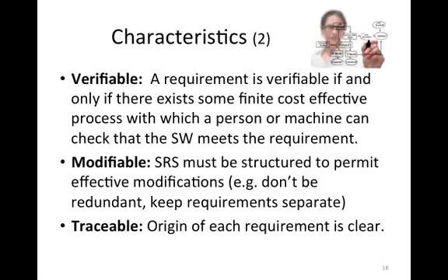We might put in verifiable requirements in terms of time. We might say people should be able to get a response back from the computer in 2 seconds. But we need things that are verifiable, and part of that is being specific. It's all about being specific.